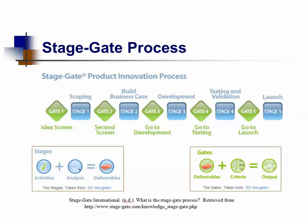Stage four is quality control, wherein testing and validation happens in a laboratory setting to verify and validate the proposed new product, the brand, the marketing plan, production, and operation strategies. The final stage is the launching — what they call commercialization — which is the beginning of full-scale operation, production, marketing, and selling.